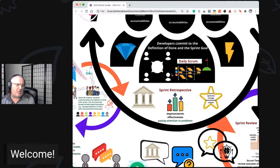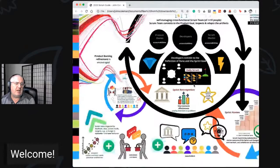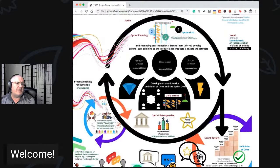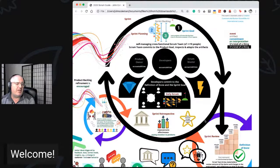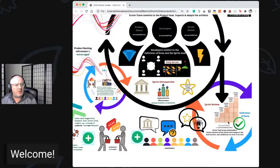A couple of tweaks also: the three pillars of transparency, inspection, and adaptation for empirical process control were always there, as were the five Scrum values which help offset the five dysfunctions of a team. But in the 2020 guide, not only does the Scrum team need to exhibit those behaviors — the stakeholders are also expected to embrace the three pillars and Scrum values. There's also recognition that you can have more than one increment during the sprint.